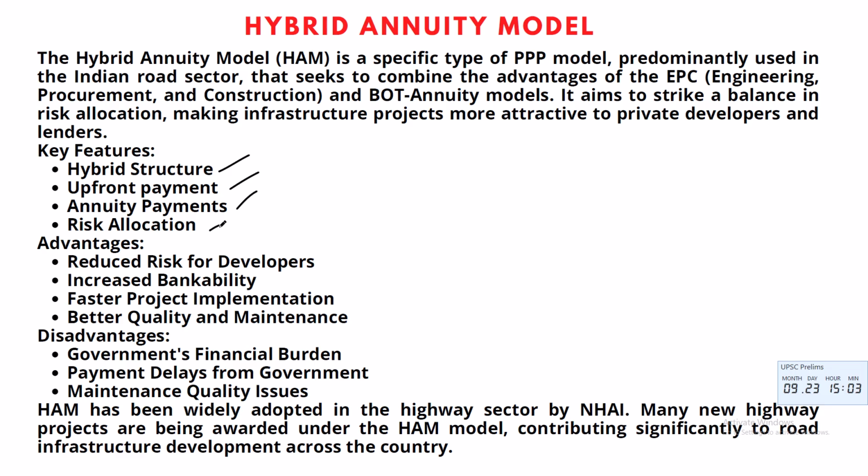Risk allocation. This is where the HAM shines. The government takes the traffic demand risk and part of construction work. The private developer handles construction work for their 60% portion, maintenance and operational risk. It's a true partnership where everyone knows what they are responsible for.